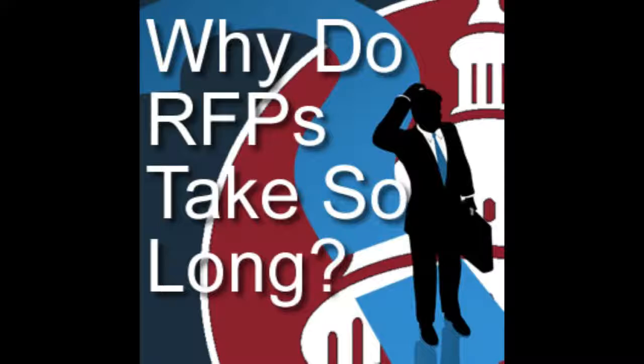So it definitely takes some time. The dollar value is kind of unique because this is something that's captured in the FAR, but really it's captured in the individual agency regulations, where all by itself, the dollar value can take time. For a simple requirement, the contracting officer or an office manager, chief, whatever you want to call them, might be able to approve the requirement and all the documentation it takes to move forward with that acquisition. But for a very large buy, just over a certain dollar threshold, it brings other approving authorities in. And to get those approving authorities to approve it, you may have to have multiple different documents complete and go through multiple pre-briefs with all of the underlings of that approver in order to even get on their calendar.